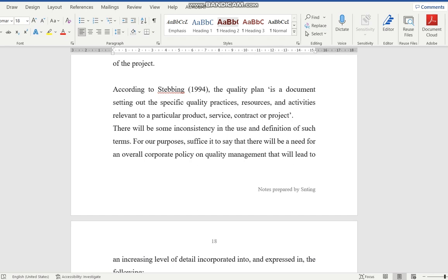So this particular document will list down all these different aspects. So this is really project quality management already. With your work breakdown, you are listing down these are the activities, and in each activity, what are the resources. And then in the quality plan, you need to specify the resources and what is needed from the resources, and then you need to talk about what is the flow of activities, the flow of practices, or flow of procedures, or flow of works that needs to be carried out.